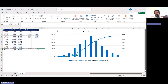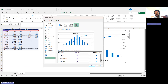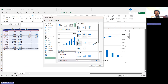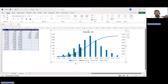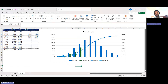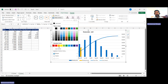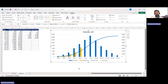I click on the chart and go to Change Chart Type. There are now four elements: monthly plan, cumulative plan, monthly actual, and cumulative actual. I set monthly actual to clustered column, matching monthly plan, and uncheck the secondary axis for it. I change the actual colors to amber — both fill and outline for the bars and the actual cumulative line — so the chart clearly distinguishes plan (blue) from actual (amber).